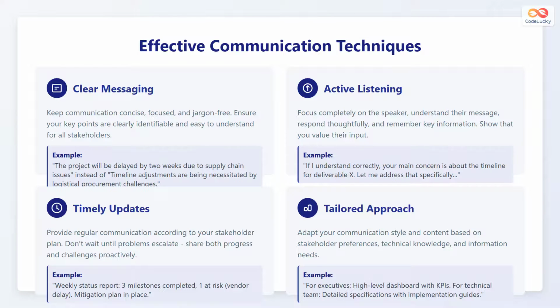Third, provide timely updates. Provide regular communication according to your stakeholder plan, and do not wait until problems escalate. Share both progress and challenges proactively. For example, provide a weekly status report with the number of milestones completed, the number of milestones at risk due to vendor delay, and include a mitigation plan.